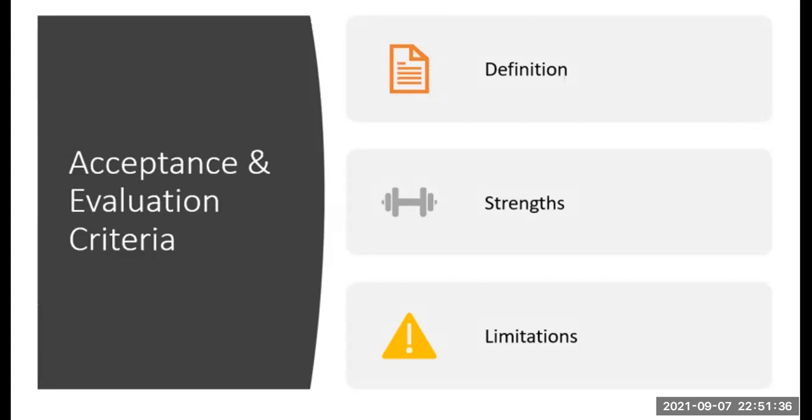So if you look at the strengths of these, all agile projects will require acceptance criteria. Acceptance criteria is mandatory for all user stories that you write in agile projects. And if you work in waterfall projects where you have fixed contracts that are non-negotiable, or if you're working on regulatory projects, maybe acceptance criteria is not a viable solution, because then you have to meet every single requirement.